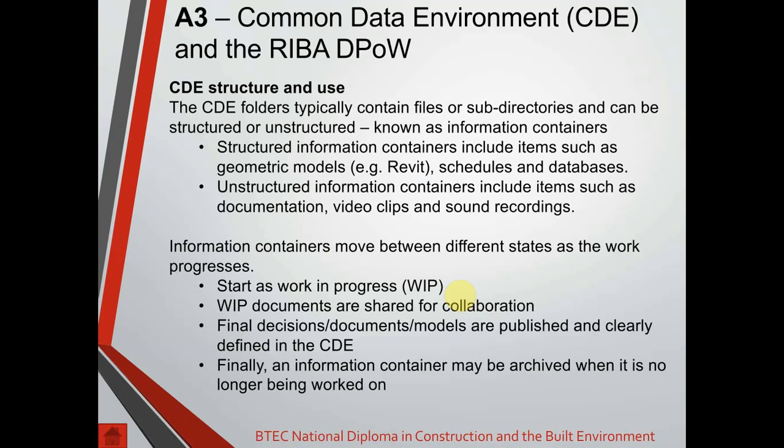And then eventually, when that project is finished and it's not being used anymore, or there's no more changes that are going to be required, that information container may still be archived. That means you've still got access to it, you can still have a look at it, but the content has been archived, it's been put away, it's not being changed, it's not being worked on anymore.